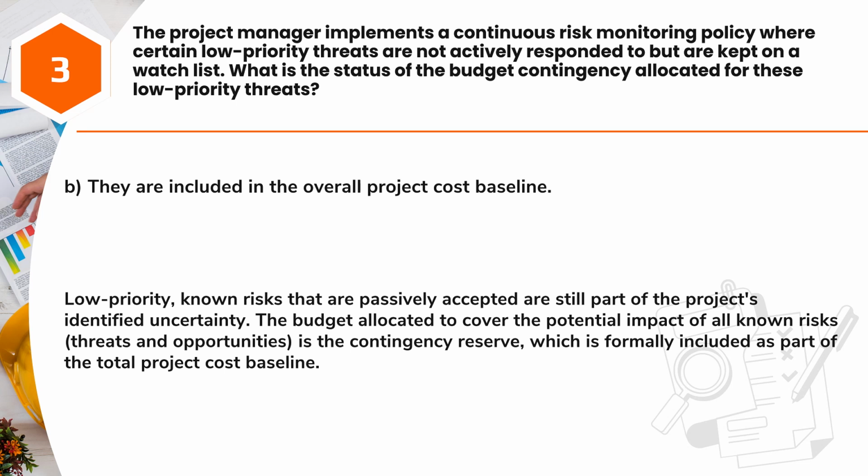Answer B. They are included in the overall project cost baseline. Low priority, known risks that are passively accepted are still part of the project's identified uncertainty. The budget allocated to cover the potential impact of all known risks, threats and opportunities, is the contingency reserve, which is formally included as part of the total project cost baseline.